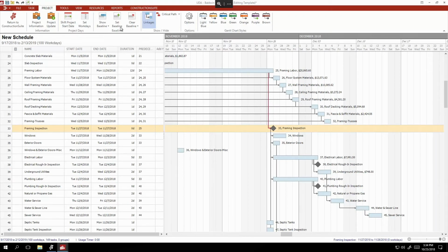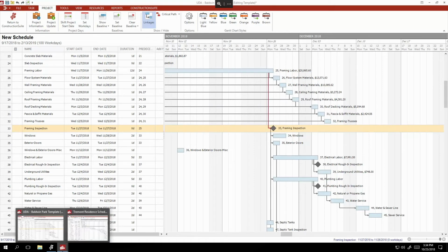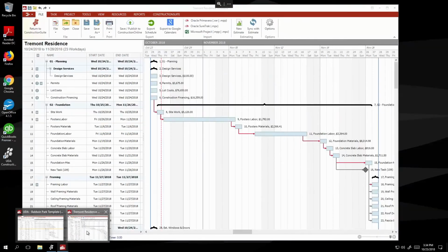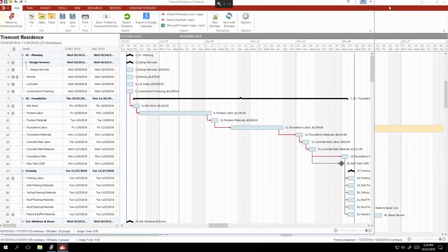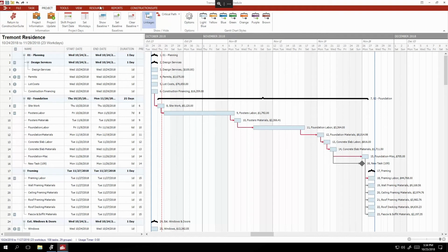It gives you the ability to set a title for that baseline. I personally prefer using the title bar as the indicator for delays. Maybe this is after, Jordan had the initial start as one of our baselines. We've put the schedule together, we haven't made any changes yet, we have our initial start. So then we might make some delays, and this next baseline that we create might be after Hurricane Hugo. So Hurricane Hugo has come through. We adjust everything after that baseline so that we can see the difference of pre-hurricane, post-hurricane. However you need to set that up.